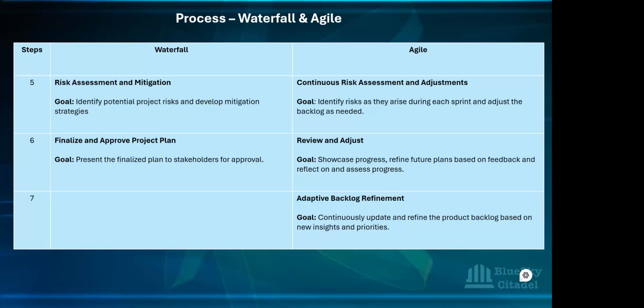Okay. So like using the example of the bookstore now. If there's customer feedback that says, I think it would be better if you add this feature, a book review feature, so that all new people coming in will read that review for the book, and it will encourage them to purchase that book. The stakeholders want it in. So there's a story that needs to be created to that effect, and they want it in before the next demo. So definitely it goes to the top of the backlog as a priority.